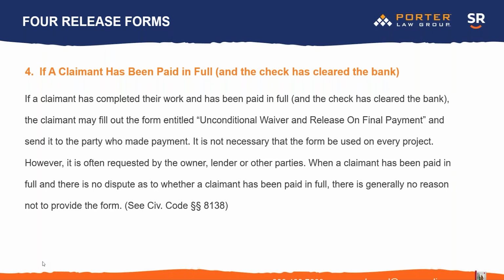If you're just running the construction project from your offices, then you use these 4 forms. When lawyers start getting into the picture later on, if need be, then there's another type of release that is just part of a settlement agreement, which is a full-blown thing that's 5, 6, 7, 8, 10 pages, depending on the situation, long. And there's other things, but these are the 4 to use for construction.